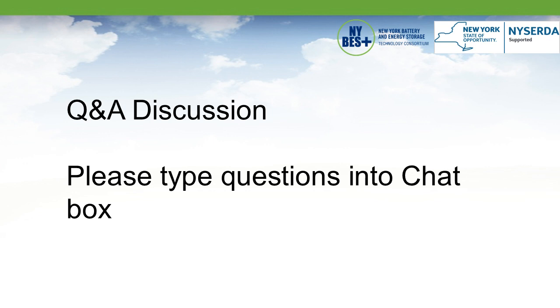Sure. Just one quick thing associated with what Jason said. When you apply with battery storage and another form of DG, you fill out the two applications. But in our Power Clerk system, there's a section where you can link the applications together so that we know they're both at the same site, and then we can move forward with an engineer studying them as combined DGs. So definitely fill that out, get in contact with us, and let us know you're installing two forms of DG at the same customer location.